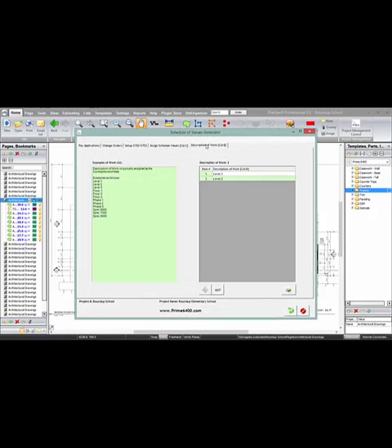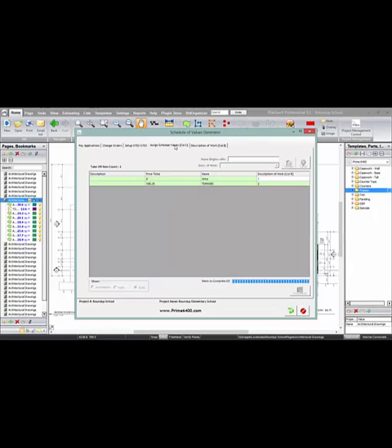Additionally, we've got a schedule of values generator. Within here, we allow the user to state what they want to put in under column B of the G703 form. So this could be by level, by floor, by phase, by specification section, and allow you to list what you're looking for in this area. Once that's completed, it'll also show you each line item of the takeoff, and with that, we want to assign to it what breakdown you want it to be associated with.